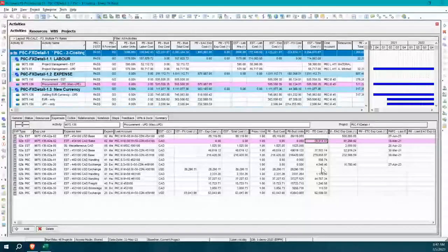Now, if you've ever tried to do costing, you know that because I have an invoice, that's not necessarily really what my actual accrued value should be, okay? Because I might know that 3 or 4 vendors haven't sent their invoices in, but we've received the equipment and we want to track that, okay?